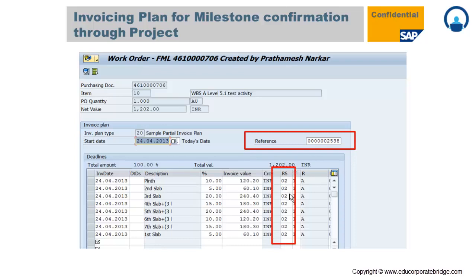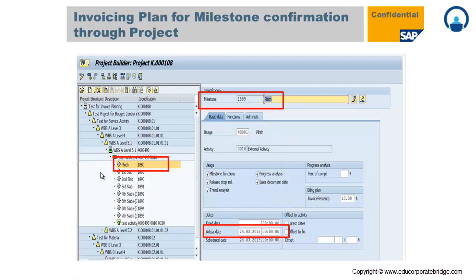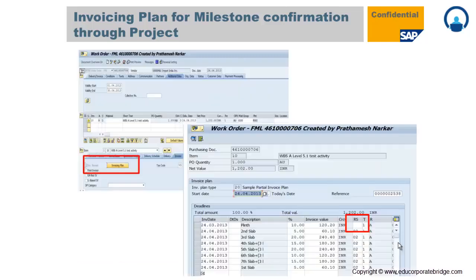In the invoicing plan there is a column called RS — the blocking indicator. Value '02' is the blocking indicator, which means even after the purchase order or work order is sent to the vendor, the system will not allow invoicing for that work order because payment is blocked through the invoicing plan. To remove this block, the project engineer goes into the project, selects the milestone, and puts the actual date — which is the confirmation of that milestone.